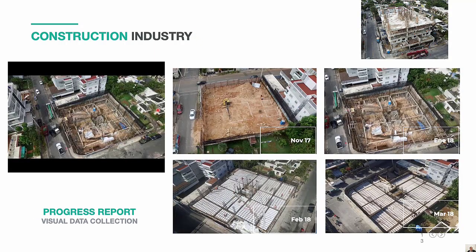For projects related to buildings, normally taking images and pictures at specific moments of the construction or where milestones are achieved is essential in order to avoid contract disputes, justify delays, or measure the productivity of the workers. After you gather all the data through the project, then at the end you can make a project review process and make considerations for future projects.